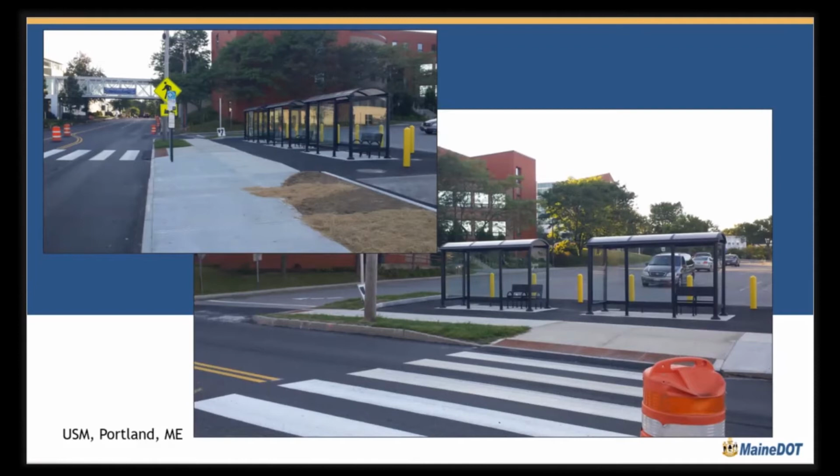We did this project without any survey. It was a bid book job. And we actually had a pretty good contractor. He got out there, he started checking grades, and he said, your design is not going to work. Our design was mimicking what you have up here, which would be an esplanade in here, and the sidewalk was back here with access to where the buses were stopping. And he could not get the grades to work. So we worked with the client as well as the contractor, suggested moving the sidewalk right up against the road, and then we had the ability to play with our grades in the esplanade behind the sidewalk before we tied into a parking lot.